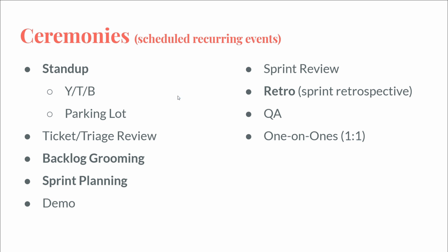And they may mark down a bunch of notes of stuff where they don't know the correct answer during their process of doing the grooming. And so then they will bring those tickets specifically to the team as a whole to discuss, to talk about and to story point or to add more detail to, and to get a better idea as to what that work will look like and how they can better prioritize it.